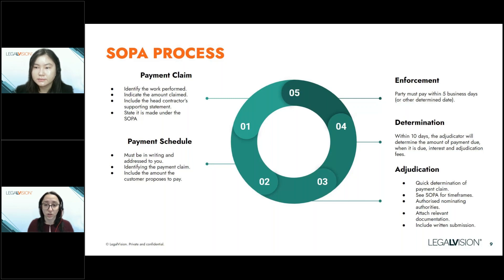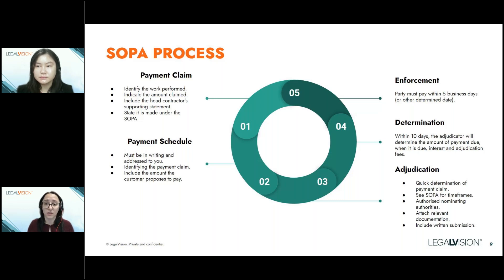There are a number of different organisations that provide adjudication services. Sometimes they're stipulated by the contract, but if not, you have options to choose from a range of adjudication providers available online. When you prepare an adjudication application, you also need to serve it on the respondent during normal business hours at their ordinary place of business and keep a record of how and when it was served. Depending on whether a payment schedule has been issued, the respondent will also have an opportunity to put on a response with supporting documents and written submissions.